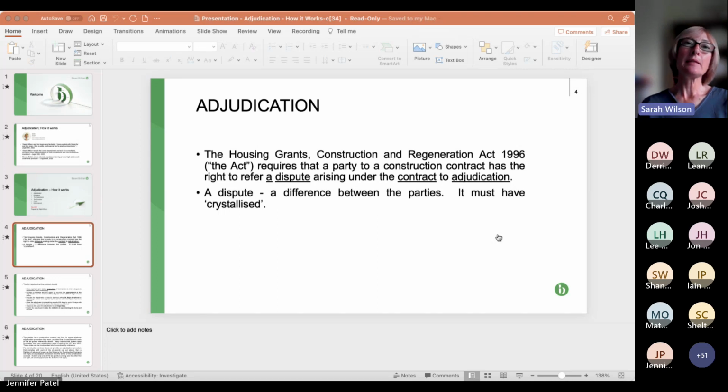And when you do start court proceedings, typically it will take 12 to 18 months from starting the proceedings to the end of the trial. So you can appreciate that if a claiming business has been held out of money that should have been paid, and has 12 or 18 months to wait to get to trial, and is also paying legal fees as the matter progresses, you can see how that could cause serious cash flow problems to a construction business.